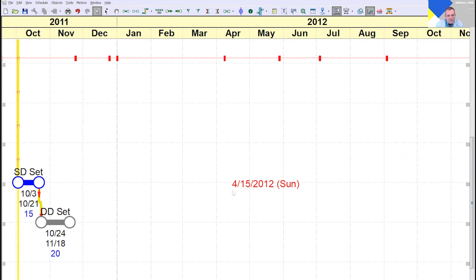Yeah, different ways of bringing in data means I have used all of these features repeatedly for different kinds of purposes. There have been cases where I've opened up multiple P6 schedules, which are more of a portfolio kind of thing, and picked up, let's say, just the summary activities. Now, NetPoint will not bring in summary activities. It only brings in activities and LOEs. So how do I work with that? I'm trying to create just a summary schedule of that entire portfolio. I select out those WBS summary activities and put that in my Excel file, import them into NetPoint as activities, and I have my summary schedule right there. I don't have to do anything with it now.